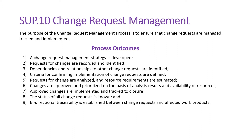The strategy defines how we are going to manage or address change requests, and must be documented as part of the project. Requests for changes are recorded, and identified dependencies and relationships to other change requests are identified. Criteria for conforming implementation of change requests are identified. Changes are analyzed, resource requirements are estimated, and approved changes are implemented and tracked to closure. The status of all change requests is known.